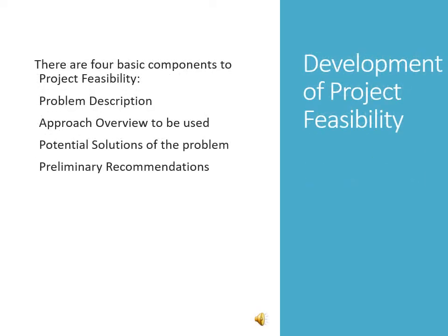The development of what we call project feasibility. There are in fact four basic components to project feasibility. First one is problem description. Second one is approach overview to be used. Third one, potential solutions to problems. And the fourth one is preliminary recommendations.